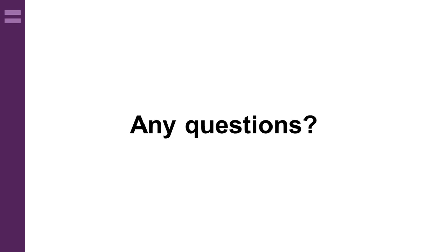A question from Ganesh. Who will be the approving authority for PID? It depends on the organisation itself. So you may have a project director if you're in a traditional Prince 2 sort of format. You may have a senior responsible officer. It's usually somebody working at an executive level. If you're being commissioned to do a project by another organisation, then that other organisation will probably want to approve it. So it's very situational. It really does depend on the nature of the project.